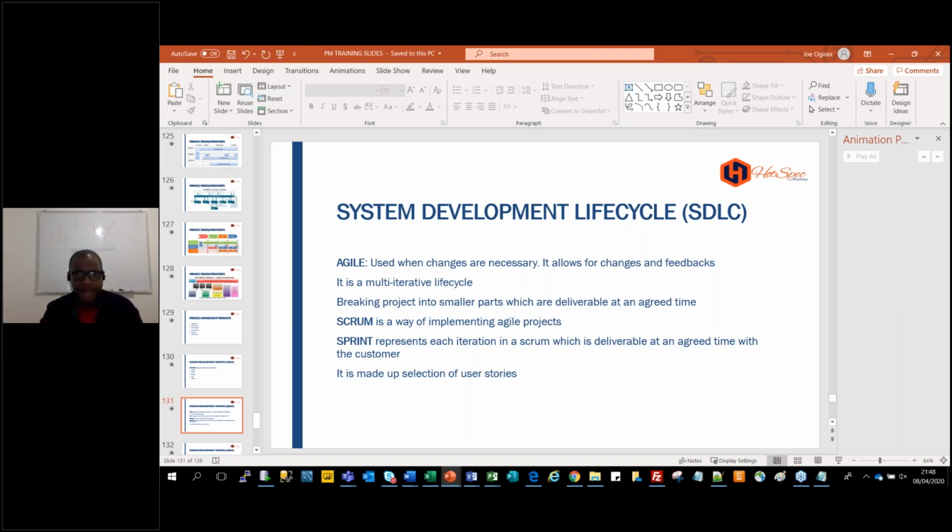As a BA and PM, that is your responsibility. Quickly alert the business: party ABC is likely to win this election. Let's hold on this project, you know why? When they win that election, their policy will affect us. It will be a waste of money. So we put the project on hold sometimes for policies, from politics, for political parties. We put projects on hold for a natural disaster that has happened recently. So all those are the continuous justification that Prince 2 is talking about.